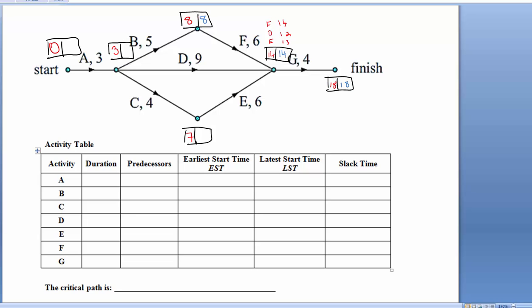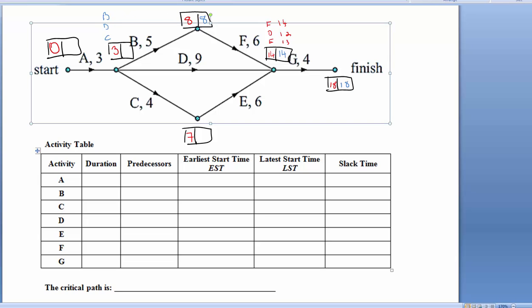At this point there are actually 3 arrows or 3 tasks coming out from A, or that depend on A. So we use a similar approach to the forward scan. We look at the tasks coming in. So there's B, there's D, and there's C. And I know 8 take away 5 is 3, so I write down a 3 next to B, and that number's yet to be determined. Alright, going back through, I'll write 14, take away 9 is, what is it, 14, 10, 4, 5.